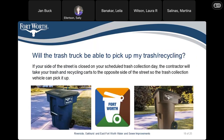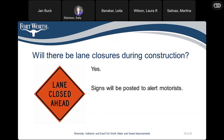Will a trash truck be able to pick up my trash and recycling? If your side of the street is closed on your scheduled trash collection day, the contractor will take your trash and recycling carts to the opposite side of the street so the collection vehicle can pick them up. Will there be lane closures during construction? Yes, there will be lane closures, but signs will be posted to alert motorists.